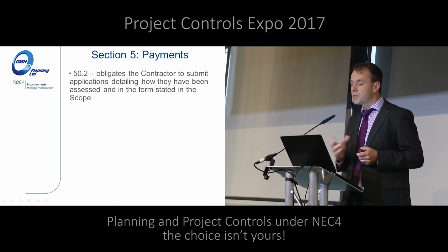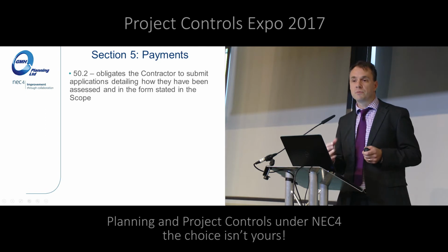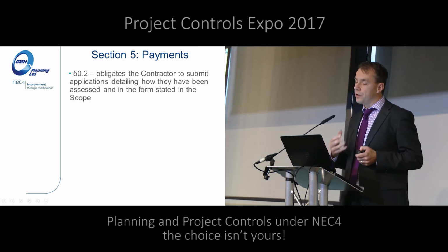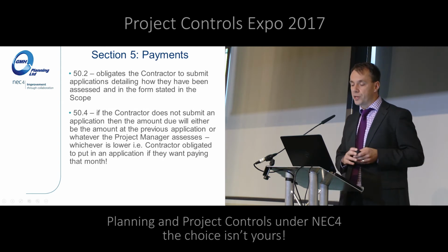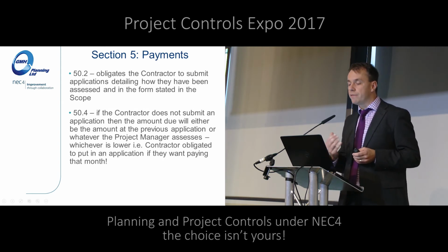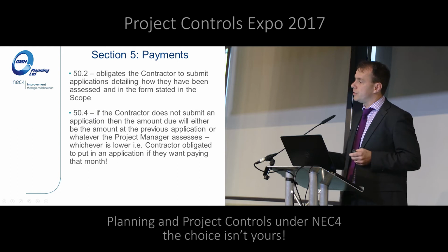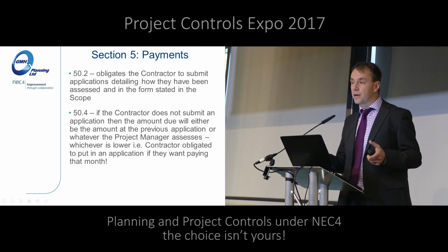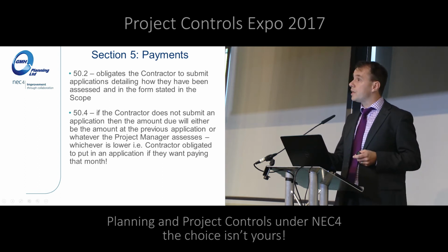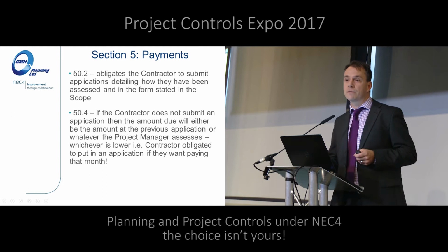Payments, couple of elements. So it obligates the contractor to submit applications showing how they've actually been assessed. So a bit more clarity on the level of detail your payment is made up of. And here's quite a big change, 50.4. If the contractor doesn't submit an application, then currently under NEC4, the project manager has to make their own assessment. Now, the project manager will say, well, it's either 0, or actually, if I overpaid you last month, it's negative.